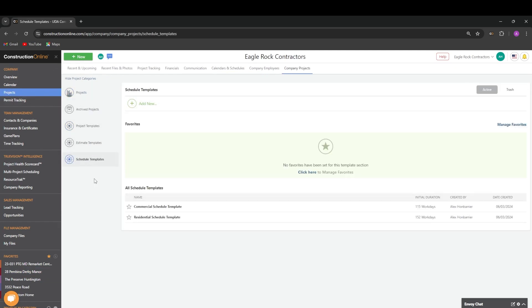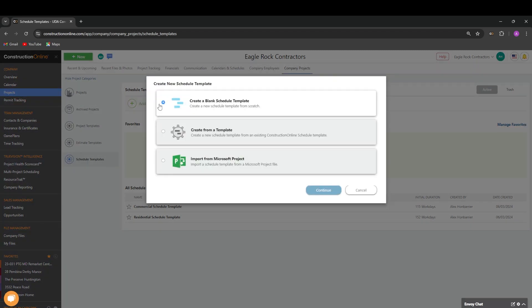Once we are in our schedule templates, we can create a new one by clicking the green add new button. Here we can create a blank schedule template, create the template from an existing template, or import it from Microsoft Project.